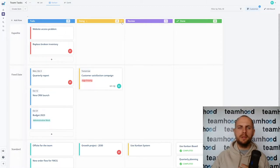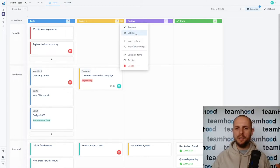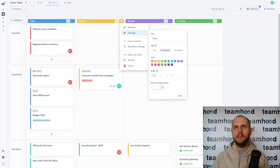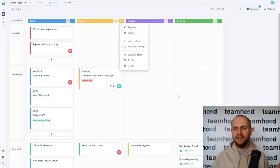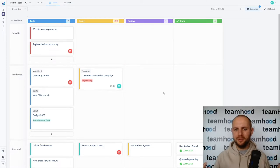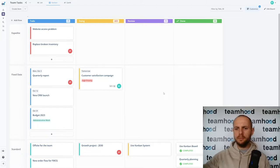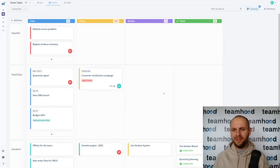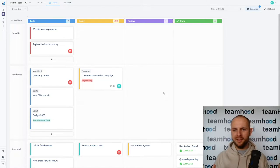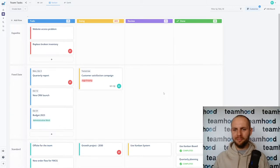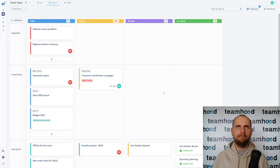That's why doing things in parallel is very unhealthy and it is solved by Kanban systems by introducing work in progress limits. Work in progress limit tells you how many cards can be in the specific status at the same time. In here I have two people working on all the tasks. The ideal work in progress limit will be two. Usually that's the right answer. What should be my work in progress limit? Well start with one. If it's not enough and you have more capacity you will slightly increase. There is this secret sauce which actually brings magic: the lower the limit the higher the throughput.